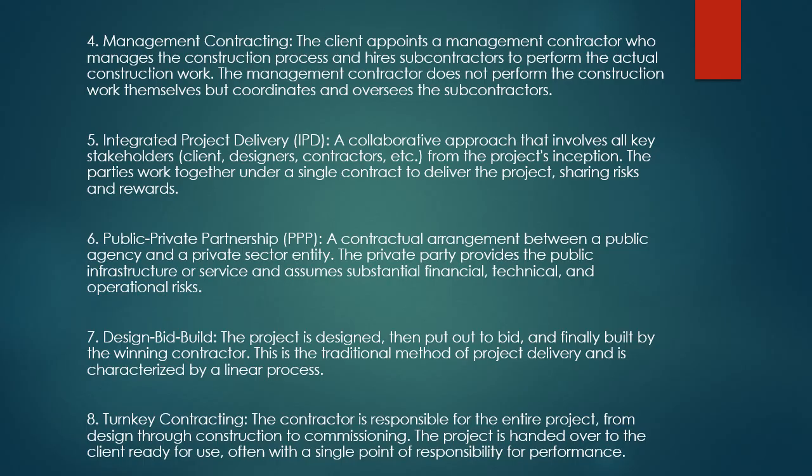Number 8, turnkey contracting. The contractor is responsible for the entire project, from the design to the construction to commissioning. The project is handed over to the client ready for use, often with a single point of responsibility for performance.